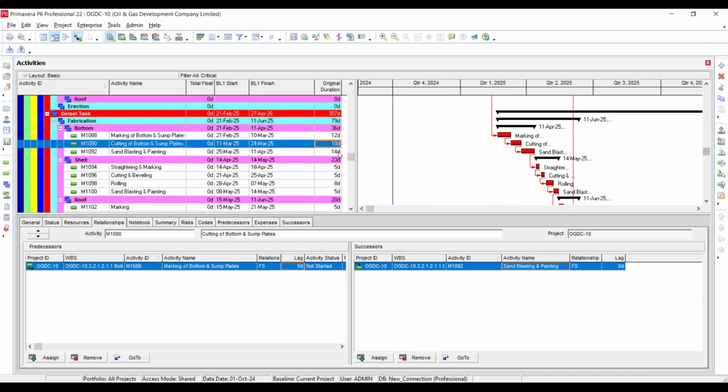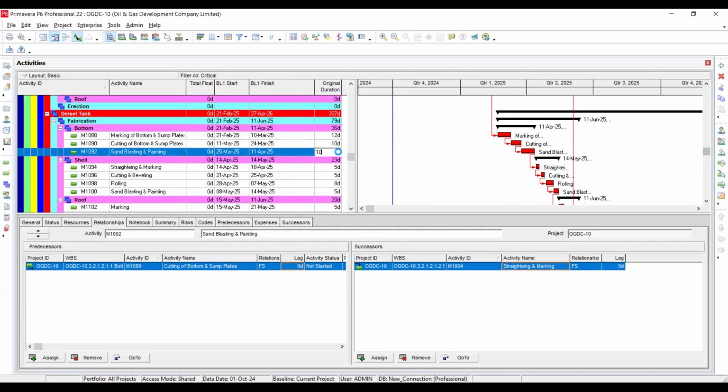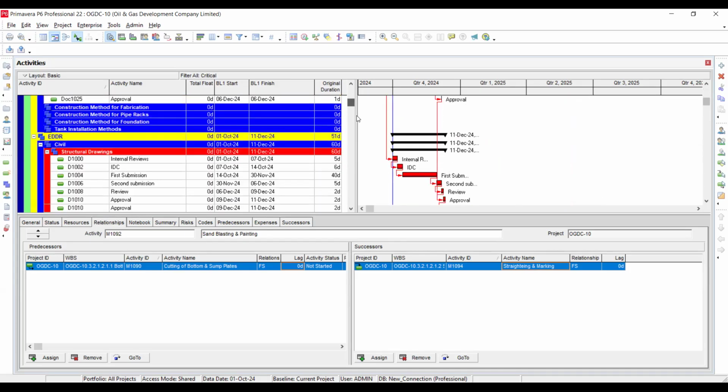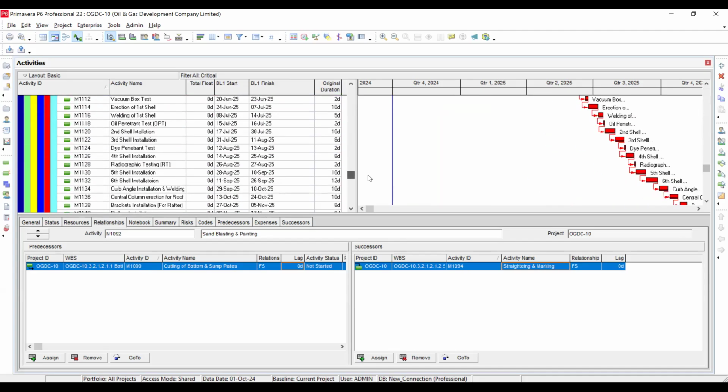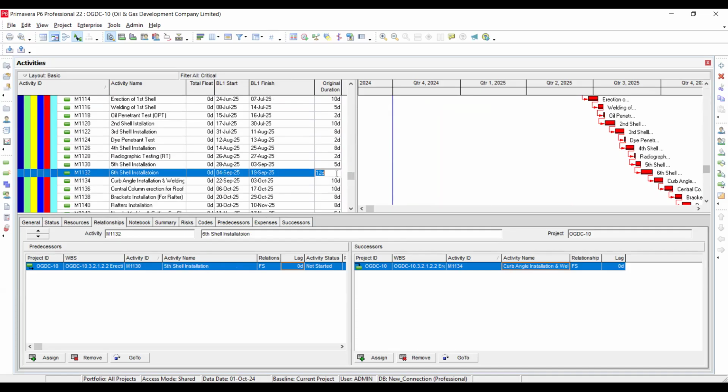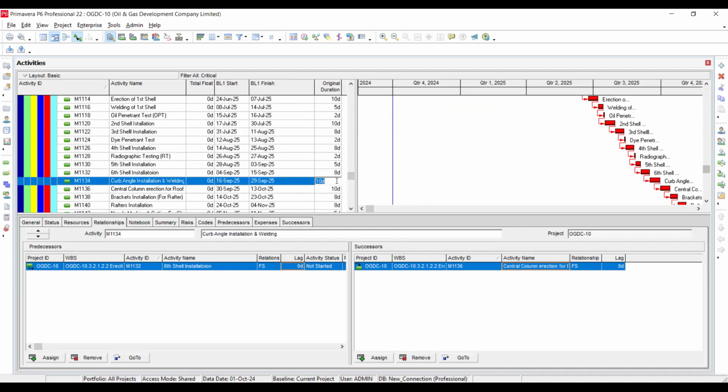This is crashing actually. I'm supposed to reduce my duration. This is 10. And now you can see my days are 406. I'm reducing it. And then you can see here, I just want to make it 5. In doing so, maybe your critical path will become non-critical, and if you are doing reduction or schedule compression techniques on your non-critical path, remember one thing, that total float is already there and it is not going to change your project duration.